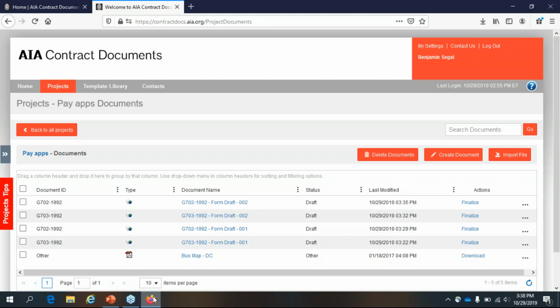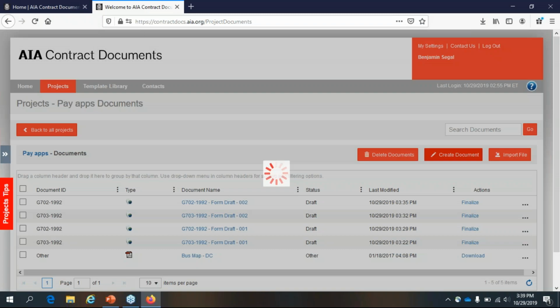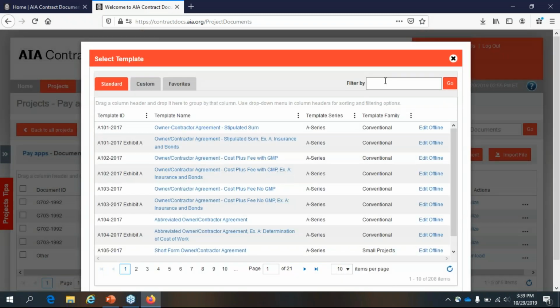All right, thanks, Mike. So this portion is not going to take nearly as long. It's the same principle as the pay app. There's no importing from the change order to the pay app directly. As I had said, change orders can happen at any time. So when there's a change order, you do a change order. When there's a pay app, usually every month, you do the pay app, and you account for the change orders on the pay app. So I just want to reiterate what I'd said before. When you have a change order, you do G701, which I'm going to talk about right now.